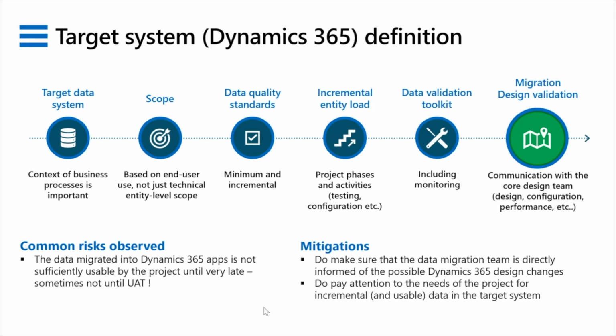Very often we see data migration progress reported as, we've got 500,000 records here, they've got 700 attributes, and we are bringing over 89% of the attributes over into the target system. People pat themselves on the back. But that is not meaningful if that data is not usable at the other end, right? You need to look at your progress very much in terms of usability of that data that's landed at the other end, not just a technical movement from A to B.